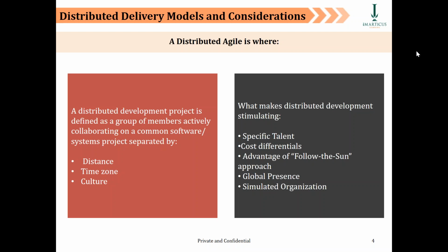As the Chinese team logs out, they hand over the agile deliverable, whether it is programming or testing or formation of test scripts, etc., to the India team, so that the India team can continue to take that to completion along with the other tasks and activities they are doing. So a handover from China to India, and then a handover from India to Britain.